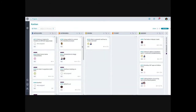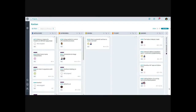We're going to look at the Fedora Magazine kanban board as an example of basic usage. You can see there are different columns representing states. The 'article spec' state is for an approved article with a rough outline that isn't actively being worked on. The card moves to 'in progress' when the author is working on it, then to 'review' when it's ready for an editor, then to 'to edit,' and once ready to publish it gets queued, then scheduled and archived.